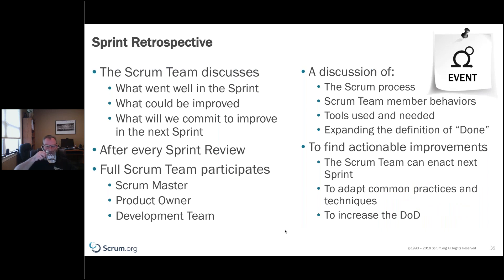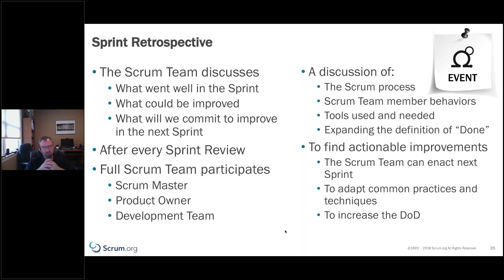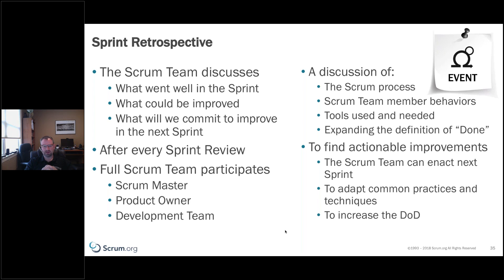The sprint retrospective is just the scrum team members — no outside participants — because we need to feel protected and safe to talk about what worked, what didn't, what we need to improve, and what got in the way of working together as a team. This is one of the most valuable events because it's about inspecting how we work and adapting as we move forward. The scrum values are critical here — we need respect, openness, and the ability to have those hard, crucial conversations as a team.